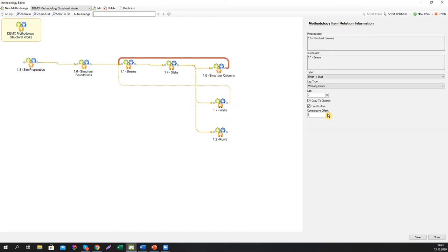This will help you in case you have, because I mean, you can do this with the lag. You can say, okay, I'm building one story in one week. So just start with the facade 5 weeks after you complete the concrete slab on certain floor.